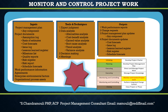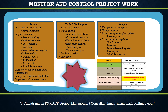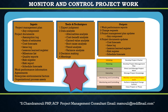The next input is Schedule Forecasts. Schedule forecasts are derived from progress against the schedule baseline and computed time estimate to complete. This is typically expressed in terms of Schedule Variance (SV) and Schedule Performance Index (SPI). For projects not using earned value management, variances against planned and forecasted finish dates are provided. The forecast may be used to determine if the project is still within defined tolerance ranges and to identify any necessary change requests.